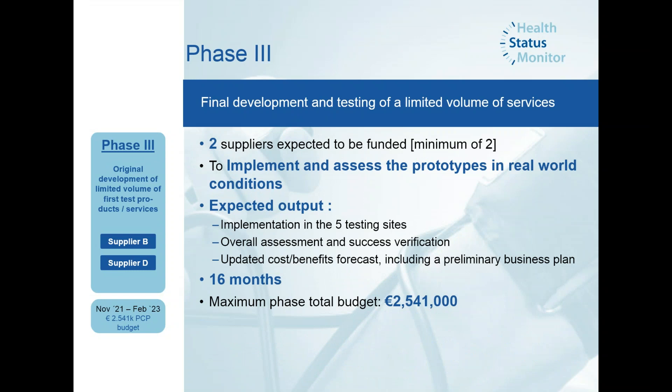Phase three is the piloting phase — the big phase where much of the research takes place. We aim to realize implementation of pilot solutions in the testing sites of all five procurers with two different solutions. The indicative budget is roughly 2.5 million euros. At the end of the phase, an overall assessment and success verification, as well as an updated cost-benefit forecast including a preliminary business plan, should be provided by the suppliers. For the pilots, we are aiming to execute with 50 patients and around 10 healthcare professionals in each of the pilot sites per solution — 250 patients and around 50 healthcare professionals in total per solution.